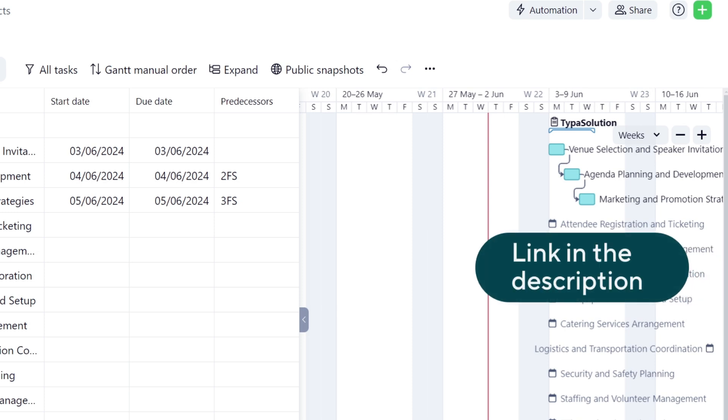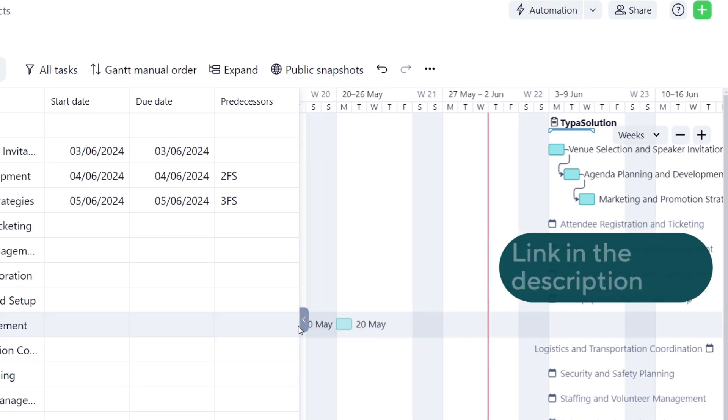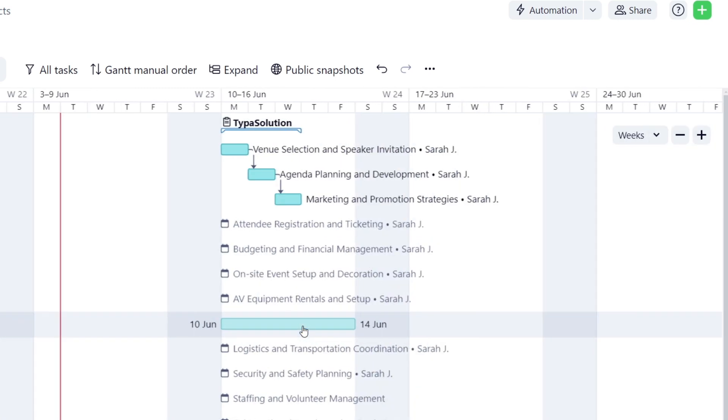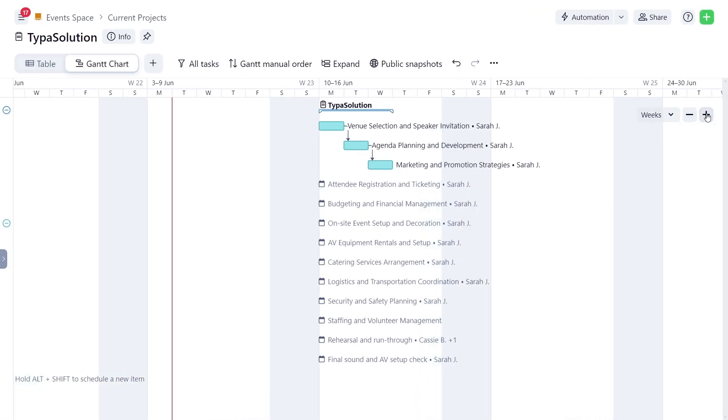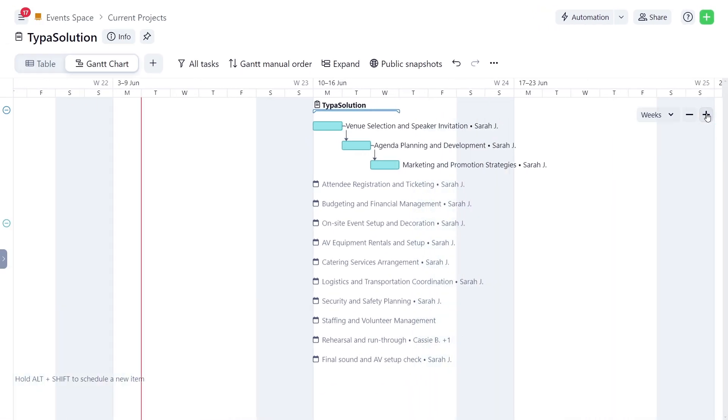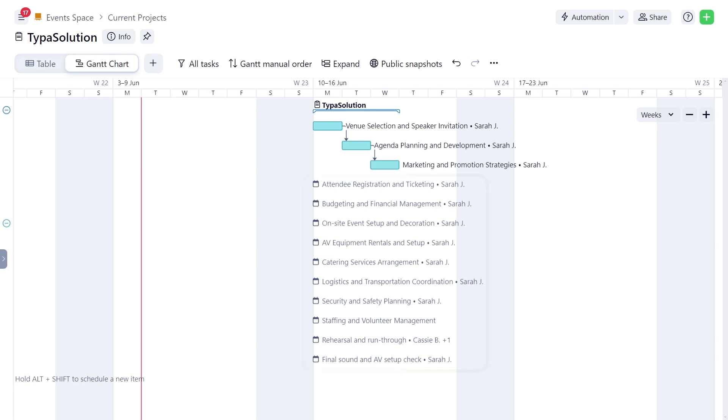Learn more about different types of task dependencies on our Help Center. Sarah collapses the table and zooms into the timeline. Here, the red line indicates today's date. Scheduled tasks are displayed as bars that span from the task's start date to its end date. Backlog tasks are indicated on the timeline with a calendar icon.